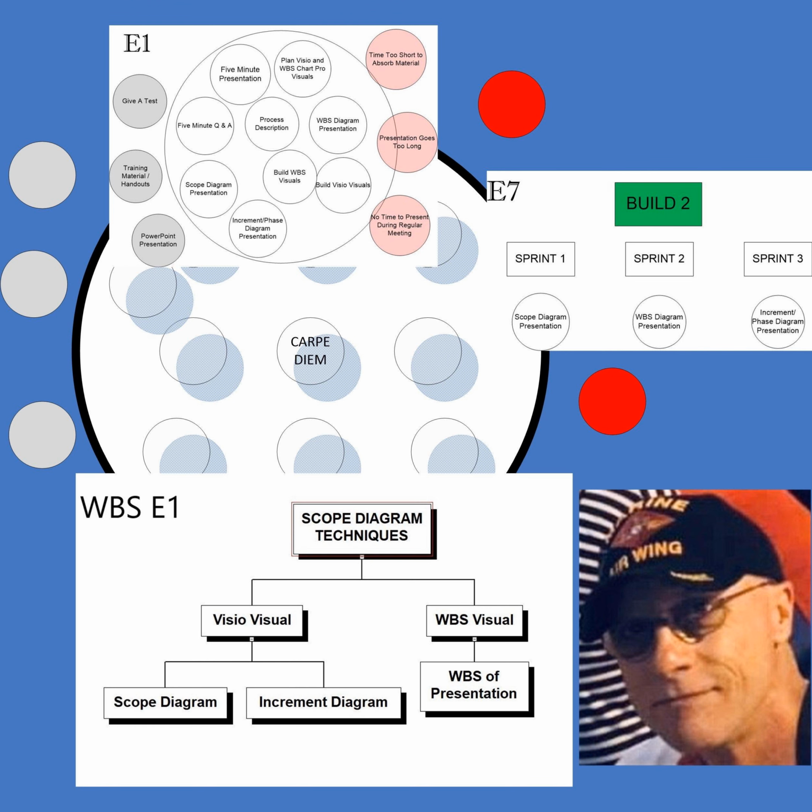If you have a deliverable and you don't have a scope bubble, you have to discuss that and figure out why. Someone could have made a mistake. Maybe it's not in the scope. Maybe you don't need that deliverable. It's not a deliverable that's part of this project. Or maybe it's not in the scope, but you go back and forth. Once you've gone through all of them and they're all yellow, that's the end of your quality check.